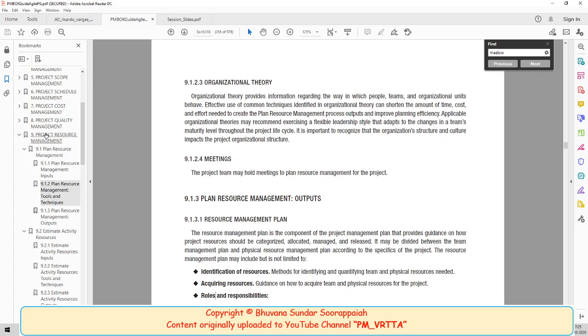In analogous estimation, I'm telling you all this so that you can understand what exactly is the benefit or advantage of a 3-point estimate. In an analogous estimation, you see similar projects that your organization has done and say that project and this project are similar, not same but similar mostly. Some parameters are changing, but generally I can use that past project as a reference, which means I can take the final estimate of that past project as a final estimate to start with for this project also at the top, and then I will break down this new project from top to down in a similar way I broke